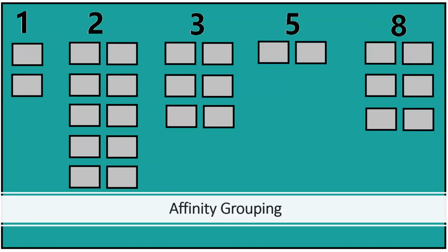As in the results, it's more prone to error because people have pre-estimated based on the tasks they've been allocated. And then you come into the meeting and you kind of accept or give the benefit of the doubt to those estimations. And that's when the planning numbers might not hold up, it's more error prone.